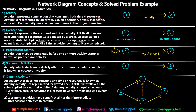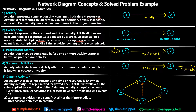There is also the concept of Successor Activity — an activity which starts immediately after one or more activities are completed. And lastly we have the concept of Dummy Activity. An activity that does not consume any time or resources is known as a dummy activity, and it is represented by a dotted line.